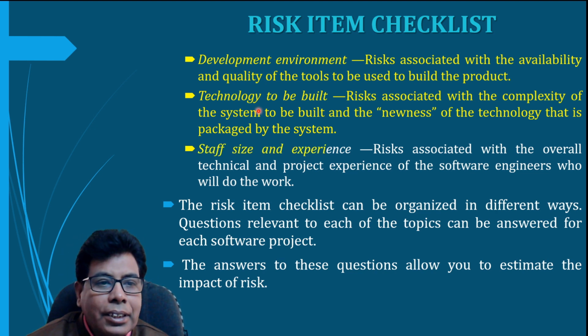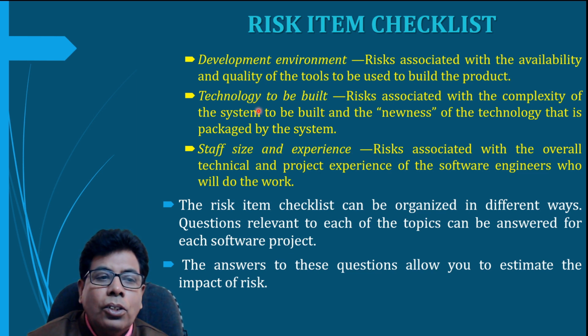Then staff size and experience: the overall technical and project experience of the software engineers who will do the work is important. If most of the members are new or don't have experience, then it will become a risk. That's why it should be a mixed team with both experienced as well as new members.